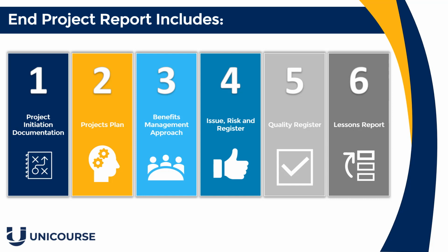Issues get in the way of progress, so encourage team members to report them to you. Issues commonly occur in projects, they happen all the time. So it's important to be able to log them down and not just look at them at the end of the project, because you may need to resolve them during, maybe, the first stage or the second stage of the project.